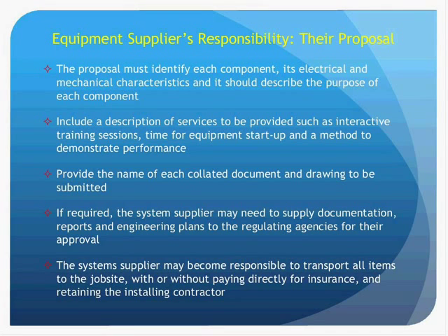The systems supplier's proposal should identify what documents will be supplied. And if required by the regulatory agency, the equipment supplier's proposal should include the costs associated with preparing a report and engineering plans that may be required for submission to a regulatory agency.